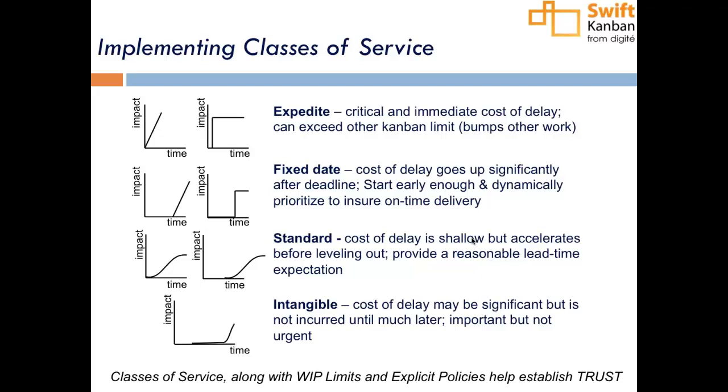And therefore, it is generally said that you should negotiate with your customer or your management to limit the number of expedited cards in the system. Generally speaking, one shouldn't be working on more than one expedited card at a time, and the number of expedited cards should be in low single-digit percentages of the total work you do.